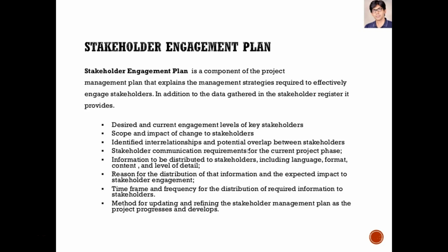So, that stakeholder plan. What kind of levels of engagement do we have current, and what kind do we have for desired? What information are we going to give these people in these groups? We're going to usually identify those stakeholders into different groups, and they're going to get different levels of information. So what kind of requirements do they have? What kind of requirements in different phases of the project may they have? Because in different phases, we may have different requirements for feeding them information.